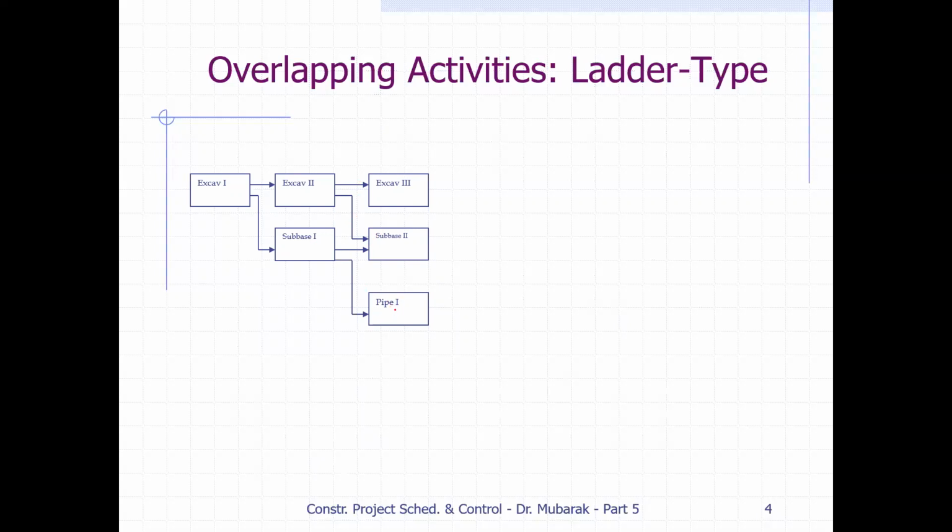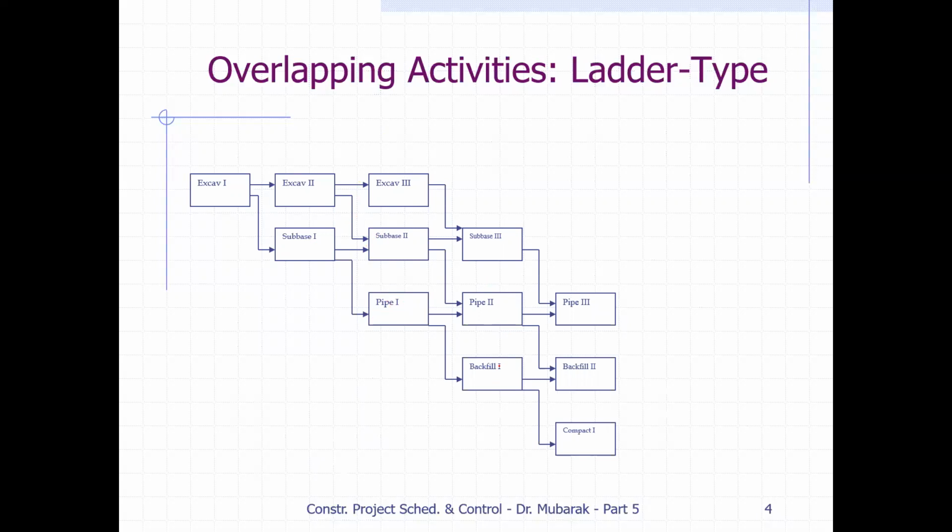Once pipe one finishes, then sub-base three starts, and pipe two starts, and backfill one starts. Once backfill one is done, then pipe three starts, and then backfill two starts, and compact one starts. Once compact one is done, then backfill three gets started, and then compact two gets started. And once compact two is done, then compact three is also done, and so forth.